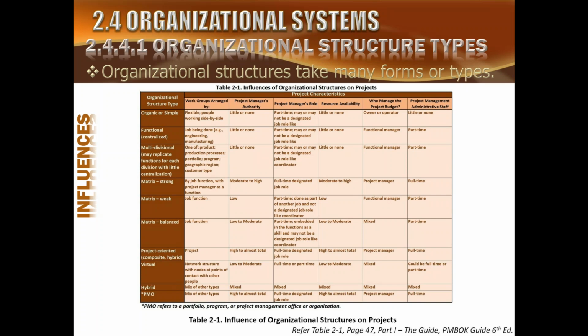Now, it does not mean that both of them are at the same level of hierarchy, but maybe there are 10 functional managers in the organization, and this project manager has been put under command of one of these functional managers. That makes that functional manager boss of this project manager. Although the persons required for the project have to be acquired from different departments, now the project manager doesn't have to run from pillar to post, because he can always complain to his boss that the other functional managers are not giving him the resources.